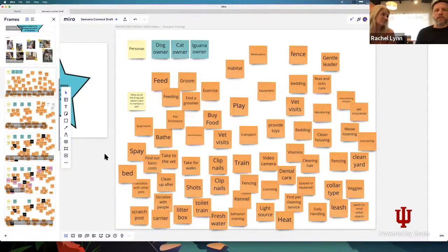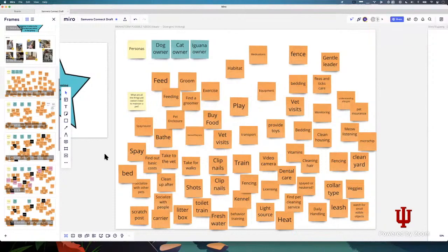So sometimes it's just more of that shared context and understanding the 50,000 foot ideation of why you're doing what you're doing, instead of being down in the trees, looking at the leaves. So you would go up, and then the developers or the project manager, everyone gets: here's where we're going, here's why we want to go there. That makes a lot of sense. And Mark from your team chimed in to say that we've often clarified requirements in ways that made the work much easier to implement. We've also found ideas that fell in the high effort, low impact quadrant that we could drop from scope. Right. Yep.